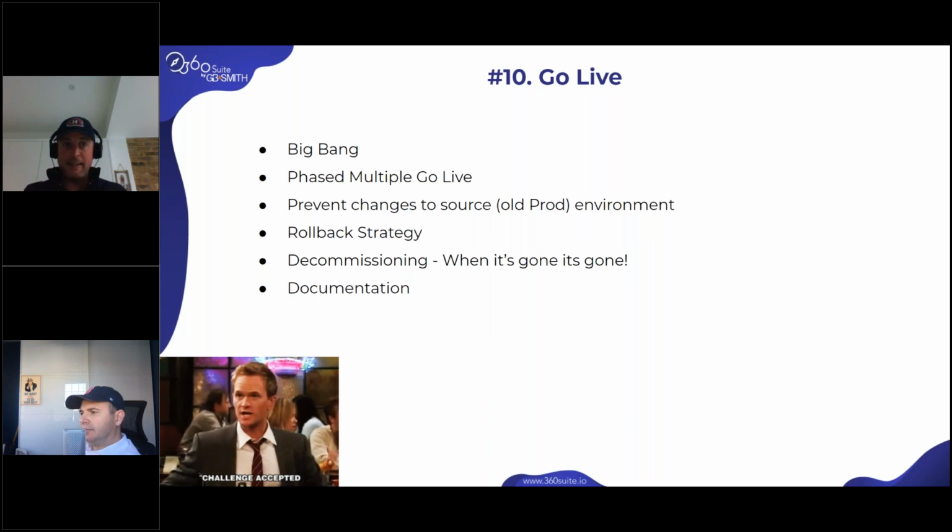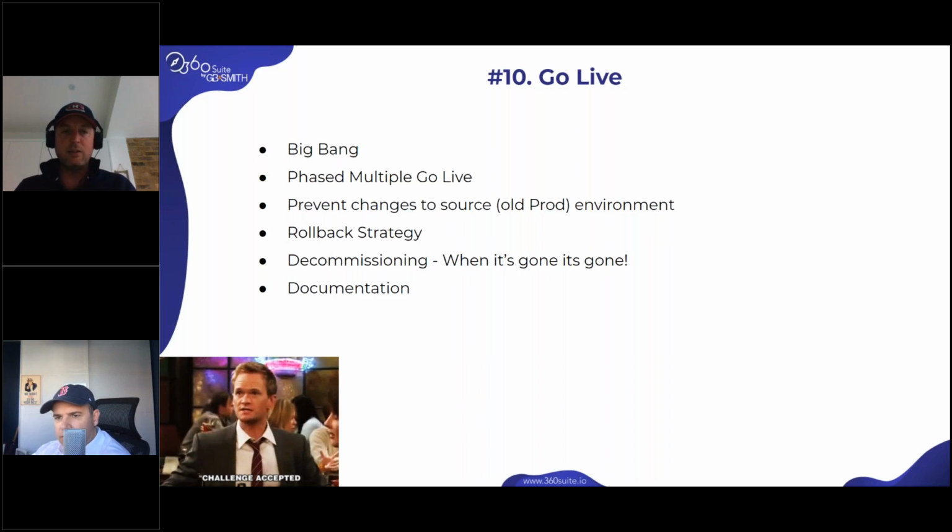Now, the go live. I said Big Bang and phase earlier. So Big Bang, it's easy. You take everything, go to 4.3, you go live. Yes, testing and all that, but everything is there in one shot. It's easy. Now, it's never easy about the Delta. Yeah, you migrate everything today. You spend a week or 2 or 3 weeks to test the users and training and all of these things, and you're ready then to go live.